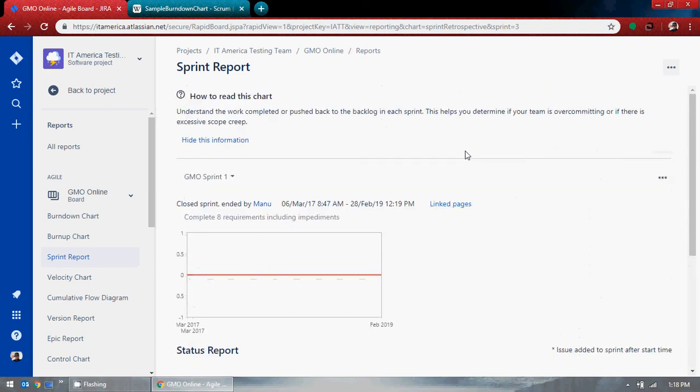Okay, so the sprint retrospective is something the Scrum Master decides and plans. So what happens? See, Agile is always moving, right? So it's always improving. So you discuss what went good, what didn't go good, and how can we improve on that. It's actually a group meeting of developers, testers, and all those people. So that is the sprint retrospective, and it's at the end of the sprint.